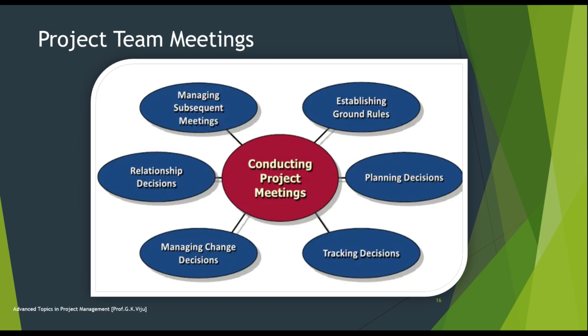And then project review meeting. This project meeting is held at the end of the project or project phase to discuss the lessons learned, both in terms of what to continue and what to improve, or what problems they faced and how they rectified those problems. Be sure to hold the meeting soon after completion before team members have moved to other work or to other projects. This project meeting is also a great opportunity to recognize and congratulate the team on their success.